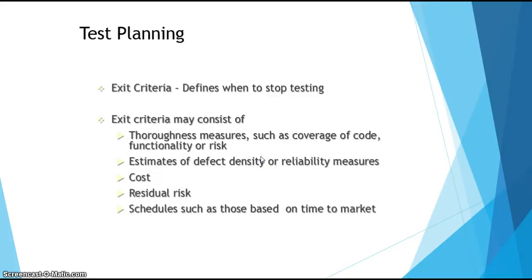So you have an exit criteria in the test plan, which I have been mentioning over all these training sessions, it mainly consists of what is the time when you're going to stop testing. That is what you're defining in exit criteria. So you can say your exit criteria is no priority 1, 2 and 3 defects, say 10 priority 4 defects and 5 priority 5 defects. These are agreed at the project level with the client.